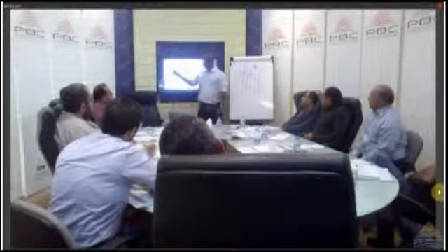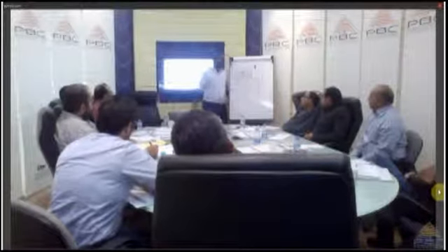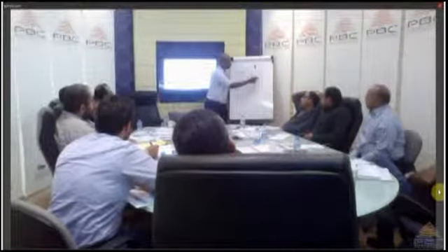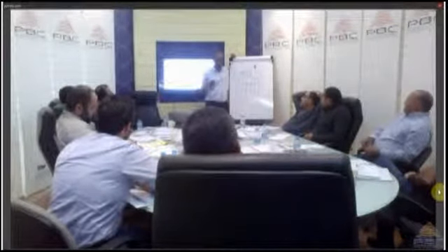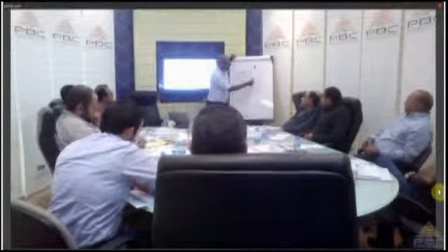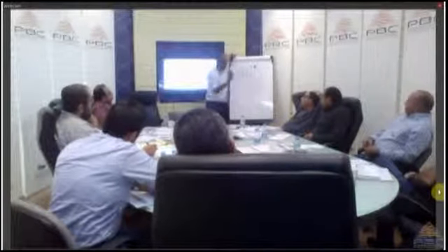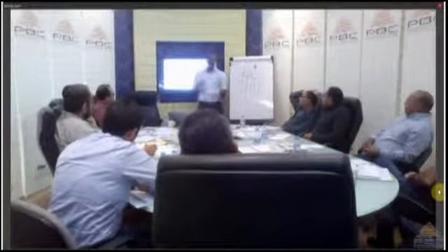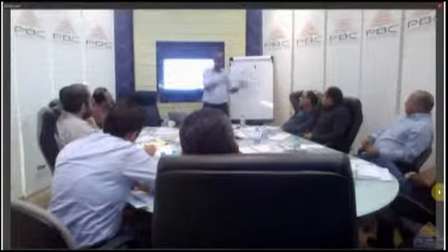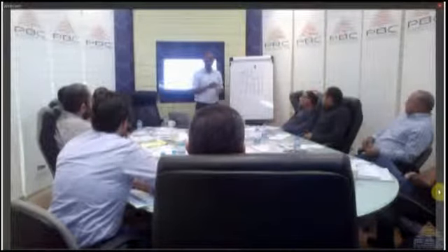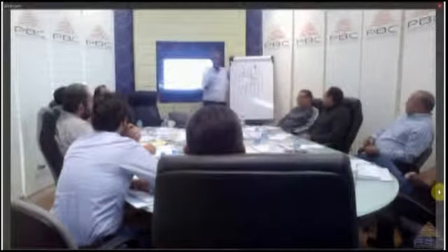If you have a 0 to 100% rule in cost assignment, you will not report on this or this, because you are saying, I will only report on them once they are completed. So it's called a 0 to 100 cost assignment. It doesn't mean you haven't spent any money here. You spent money, but you're not reporting until you finish, because you're using the 0 to 100% rule. Now this creates problems like the one we've seen between Usama, Ihab, and who was the other victim? Wahib, yeah. Okay?